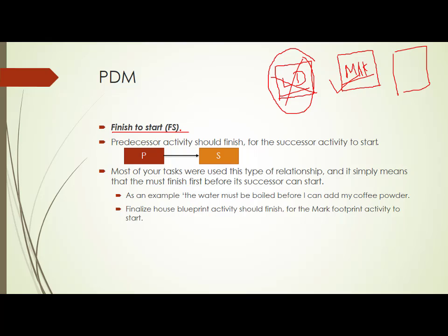See, for example, let's say you have a design of a project, then you have coding of the project. I am just giving an example. After designing is completed, only then you can start coding. When you have just started designing, can you start coding? No, you cannot, because your design itself is not complete. How can you start coding? Once the design is completely finished and people have approved it, then you can happily start the coding work. If only 10% of the design is completed, can you start coding? It cannot happen, because then the coding may go wrong.